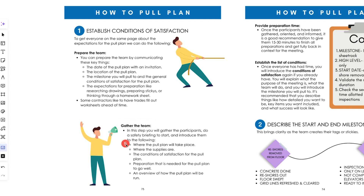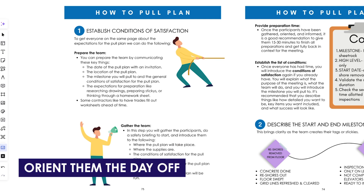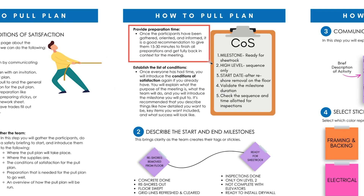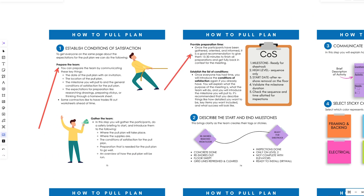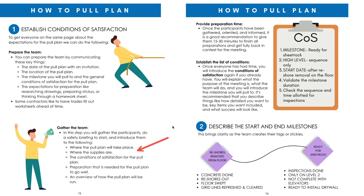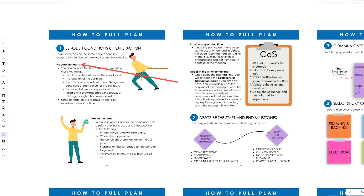When we're there, we gather the team and talk about where the pull plan is taking place, where the supplies are, the conditions of satisfaction, and do an overview to orient them. I like to give everybody 15 to 30 minutes at the beginning to finish preparations — review drawings, go through activities, prepare stickies — so everyone is fully in context.